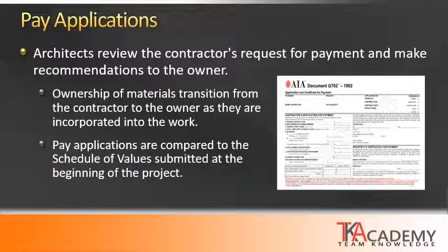It has been mentioned a few times now that one of the architect's roles during construction is to review the contractor's pay applications and make recommendations to the owner for payment. A couple bullet points in this is that typically the ownership of materials will transition from the contractor to the owner as they are incorporated into the work.